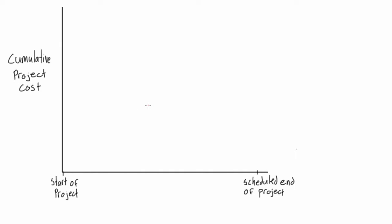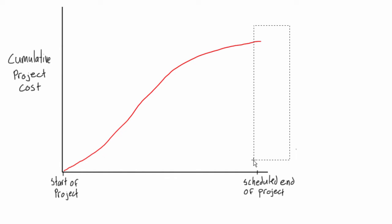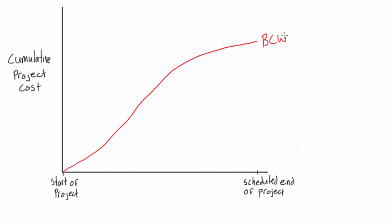If you recall from the previous videos when we were doing our baseline S-curves, it's just a cumulative project cost over the duration of the project. We generally find a trend where we get some curve that levels out at the end, lining up with the scheduled end of our project. This cumulative cost from our S-curves is also what we call BCWS in earned value analysis.